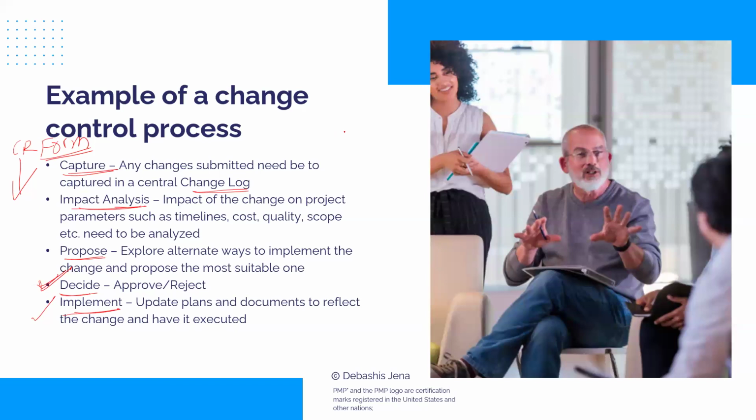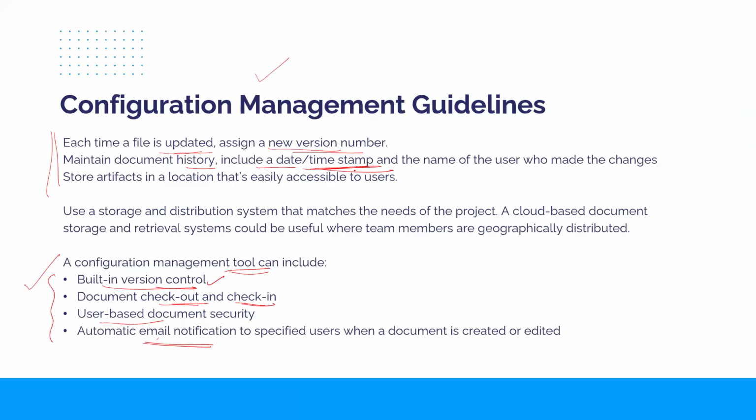But an exception to the rule: PM should do a first level screening of the changes. That's PM's responsibility. Screening means whenever a change comes in, PM would see, is this change a value add? Is it in line with the project objectives? If it is an unnecessary change, no value add, then in that case, PM should discourage the change then and there, rather than invoking the detailed process. See, invoking this process means we are spending effort in impact analysis, exploring options and all. So this should only be done for legitimate changes. So that's one responsibility of PM.